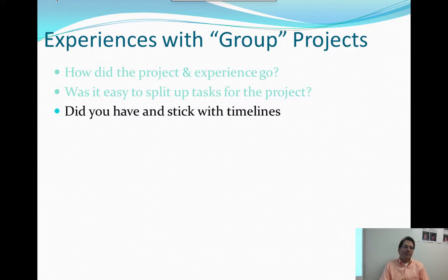And then, obviously you had a timeline in the sense that you had a date that you had to finish by, which was the end of school. It was the final project. So you knew you had to finish by that date, but did you work it backwards to say, well, in order for us to finish by this date, we'll need to have built this and this and this so many weeks prior? The design would have to be finished by this date. We'd have to have all the wood cut by this date. We'd have to have all the chicken wire stapled by this date.